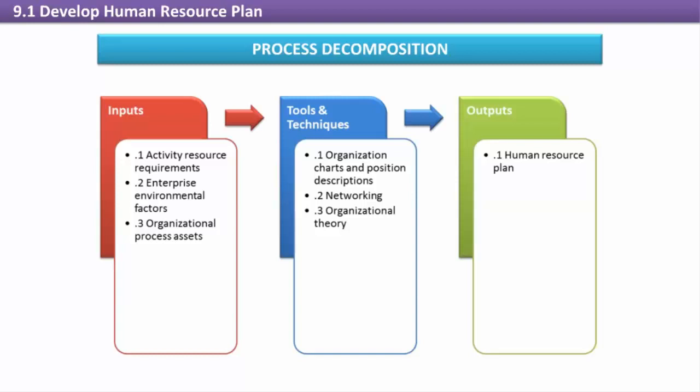In order to determine what kind of team the project will require, we need the Activity Resource Requirements (Section 6.3). From it, we will be able to determine the types of roles and skill sets the project staff must have to meet the project objectives. Lessons learned from prior projects should be reviewed by the project management team, as mistakes, issues, or situations encountered by other project management teams can help avoid similar events.